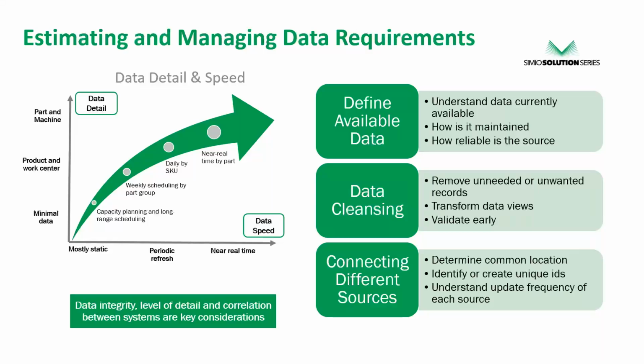It is sometimes hard to understand everything that is currently available and really what all of that data is telling you. And if you don't have a data representative on your project team, you have to almost build in extra time for yourself as the modeler to get your hands around what data is available and how I can use it.